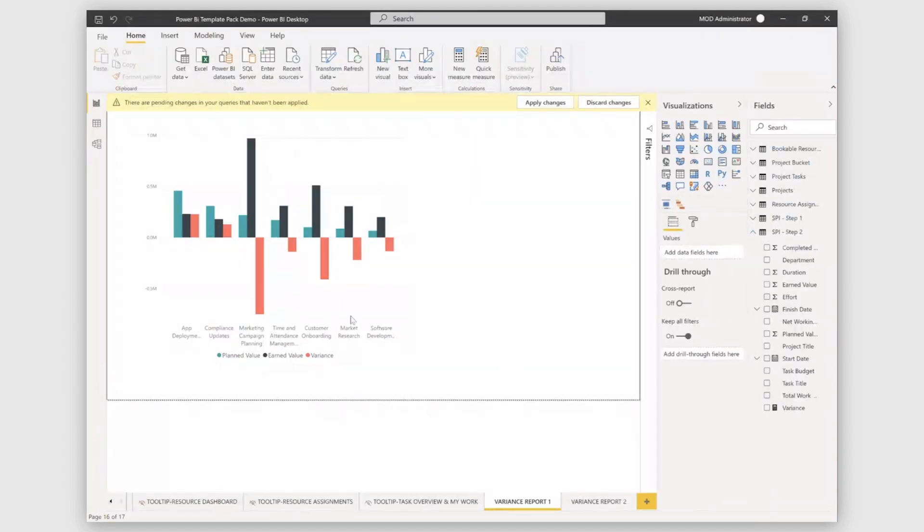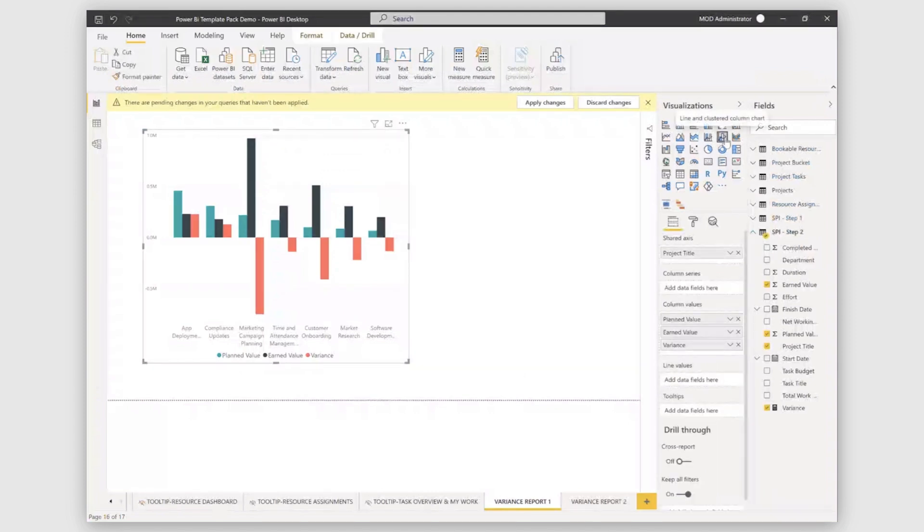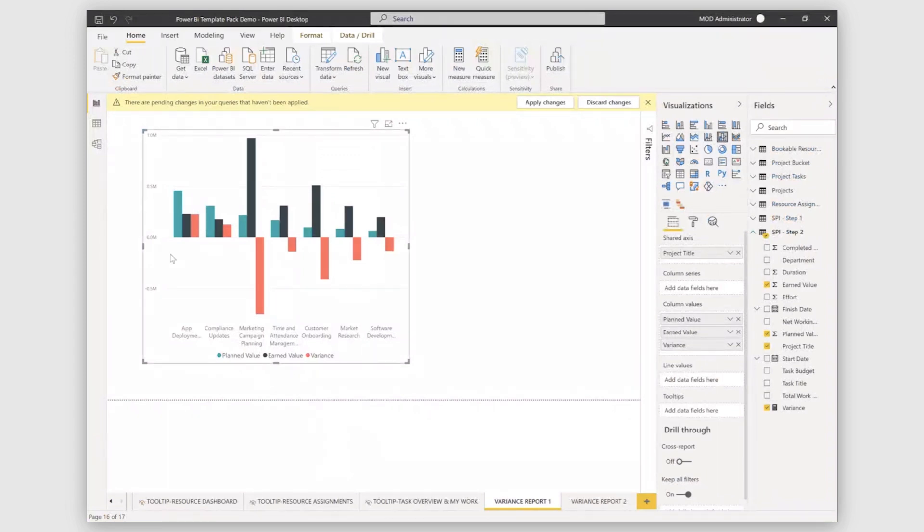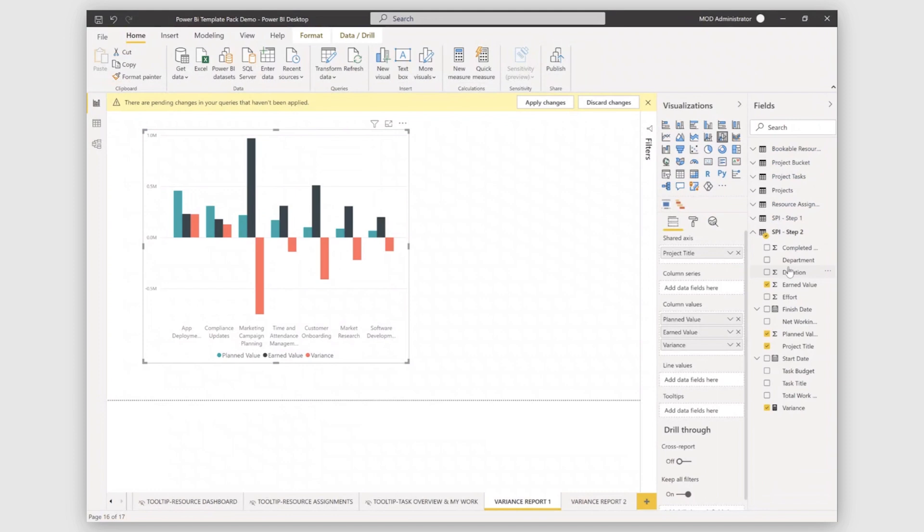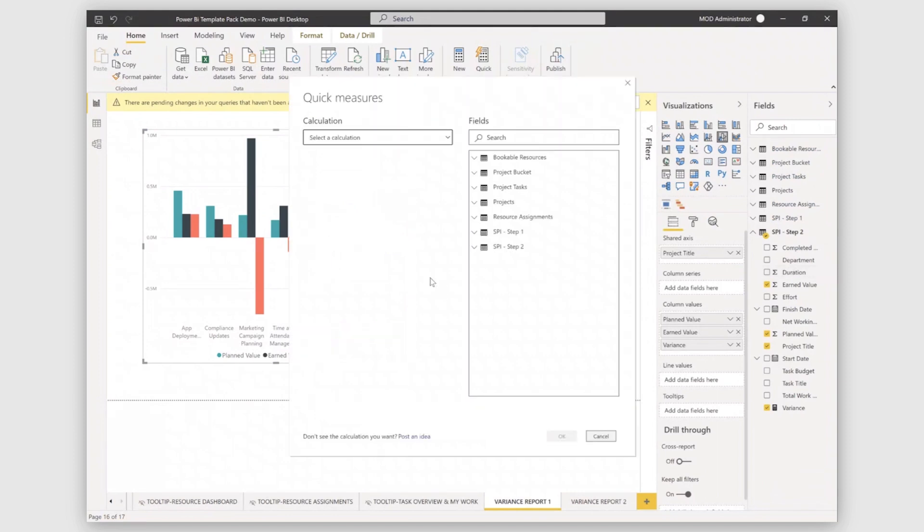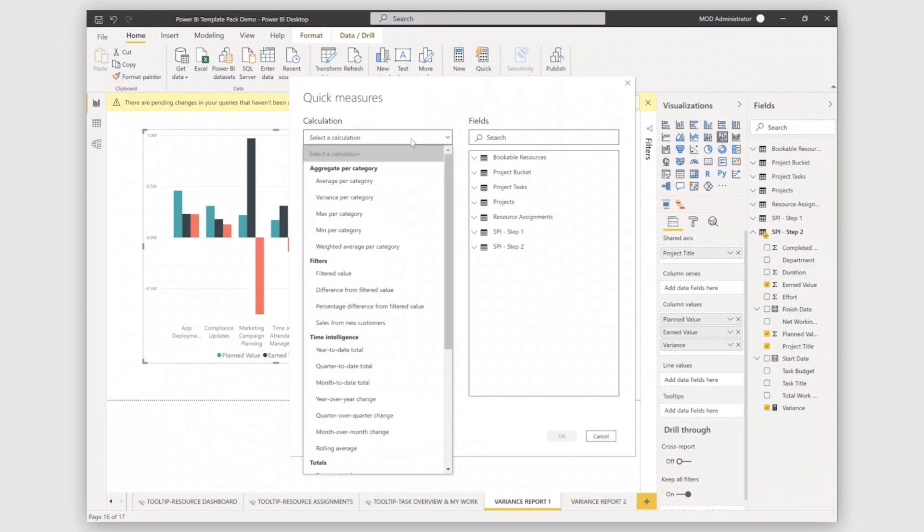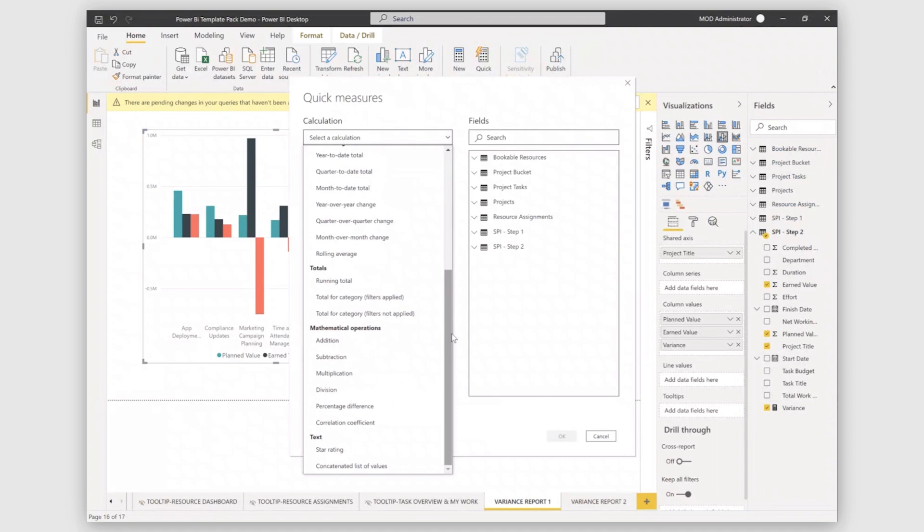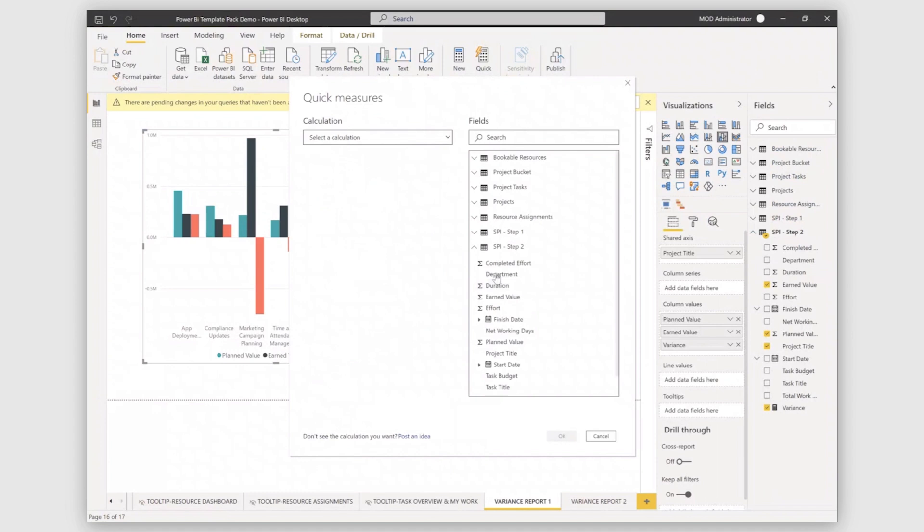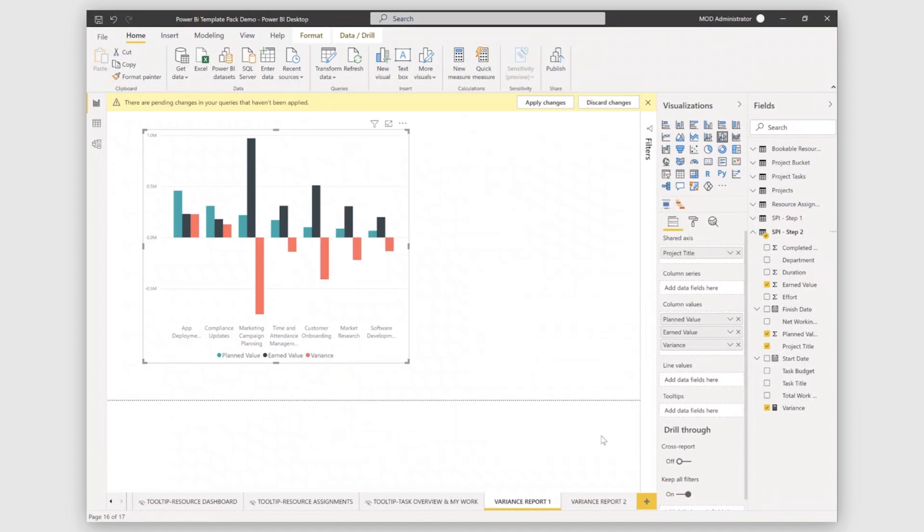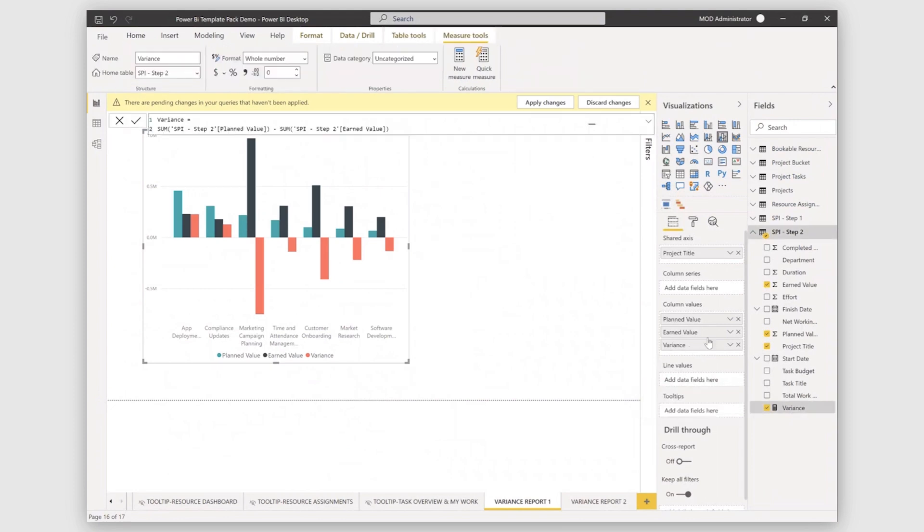Coming on to visual, you can select a clustered column chart from here. And in a shared axis, you can put project title and your column values will be planned value, earned value. And to calculate variance, you can just go and create a quick measure. You can see that you can add any kind of operation from here. I have taken subtraction and planned values and the earned value difference. So this is my variance. You can see that I've added variance to this visual as well.